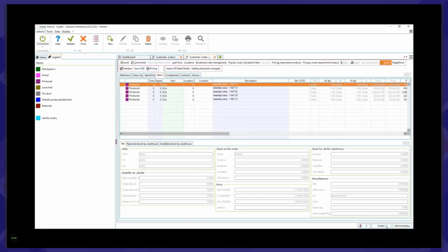And just like that, all the data pertaining to those 5 assemblies has been sorted, and it's even giving me theoretical values for the cost. Why I call them theoretical values is because we have predefined times per operation and costs associated by workstation. And of course, there was the preliminary material consumption that was executed, but we don't know the true bars that we need to order, etc. So that's why these are theoretical values.